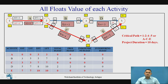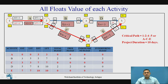Let's find all float types for activity A. Total float: LST minus EST = 0 minus 0 = 0. Free float: activity A has two succeeding activities, B and C. EST of B and C is 3, minus EFT of activity A which is 3. So 3 minus 3 = 0 for both B and C as succeeding activities.